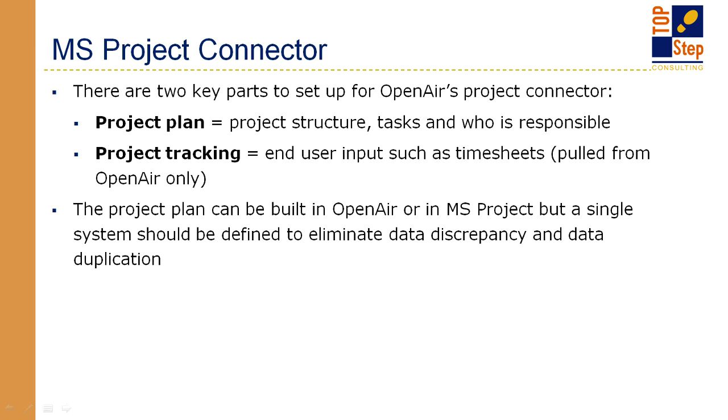Or different project managers want to do it different ways. It's really important to decide how you're going to do this. What system is going to be the system that you're going to use? Because if you manage this in both places, there is often data duplication and data discrepancy issues, because you're doing things in two different places and trying to push them back and forth. So that's the real big thing to remember when you're looking at using this Microsoft Project Connector.